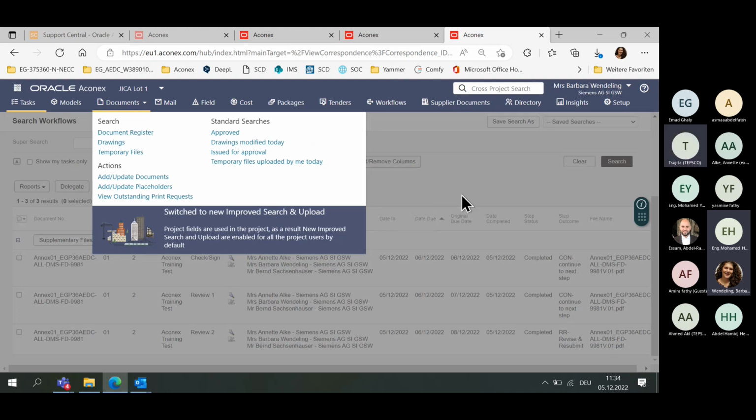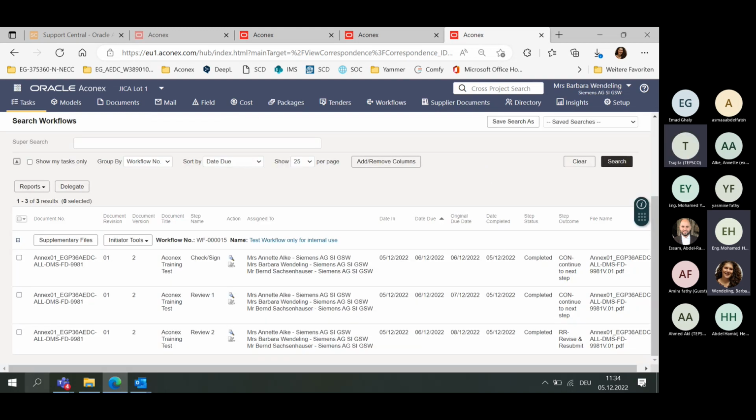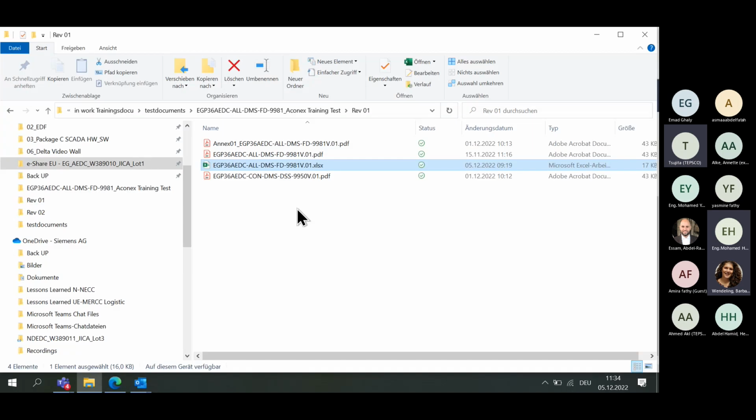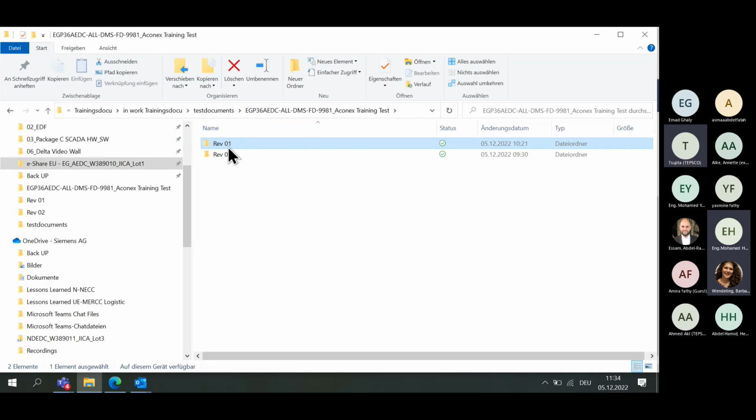Now we know, so we updated the documents. I did it here already. And we download here in our internal folders the comments from the customer, then our engineer will update all the documents, bring the comments into the documents, make the documents again as a PDF, and, in case we use this process, the engineer will put the answers to customer comments in this Excel sheet again.